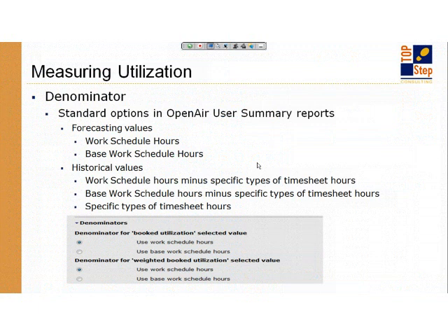The base work schedule is number of hours per day, days per week, weeks per year, period. So in the U.S., it's typically 8 hours a day, 5 days a week, 40 hours a week, 52 weeks, 2080. You'll hear 2080 a lot. Okay, that's base work schedule. The work schedule takes out anything that is an exception, such as recognized bank holidays, and depending on your configuration in the system, you may also have vacation requests making a schedule exception in people's calendars.